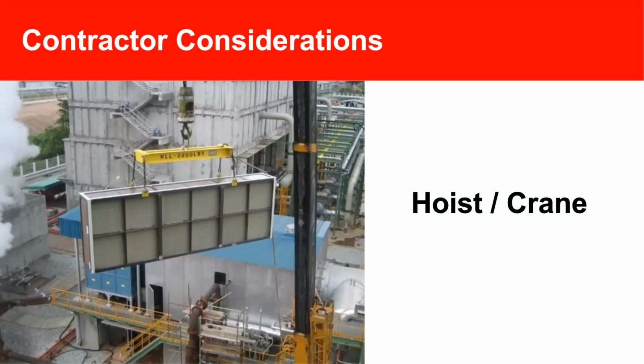That selection could be key. The second thing, and it's often an overlooked thing, is potentially changing the arrangement of your hoist and trolley system. We've seen in the past that using such things as a dual hoist and trolley system can minimize the amount of time you're watching that empty hook going up and down 60, 80, 100 feet at 10 feet per minute, which can get a little exhausting. So figuring out the best arrangement to maximize that time is key. And I think probably the most important thing after all that's said and done is having a crew that is well trained and coordinated to minimize the time that the lift is actually not taking place. That's a big key.